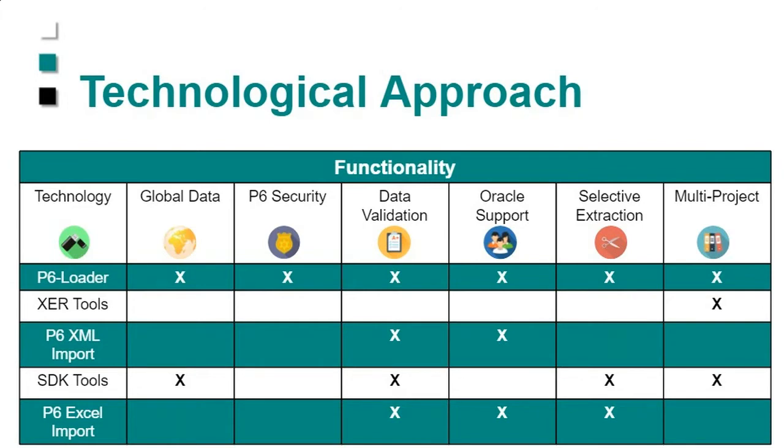The problem with that whole process is when you import an XCR into Primavera, there is no data validation at all. So if you make a mistake and you type something incorrectly, it's going to crash your system, and Oracle will not support you if that happens.